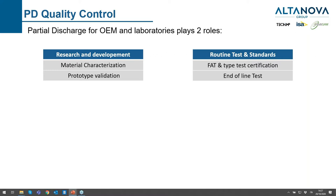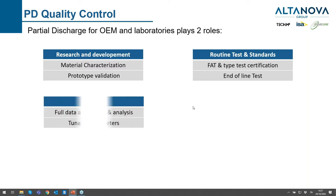The second role, which is more the quality role, is the factory acceptance test and the type test certification. If I am producing high voltage cables, I have to test all of them, and all of them shall have a very low partial discharge level and shall be done as a routine test — repeating the same actions and the same procedure every time.